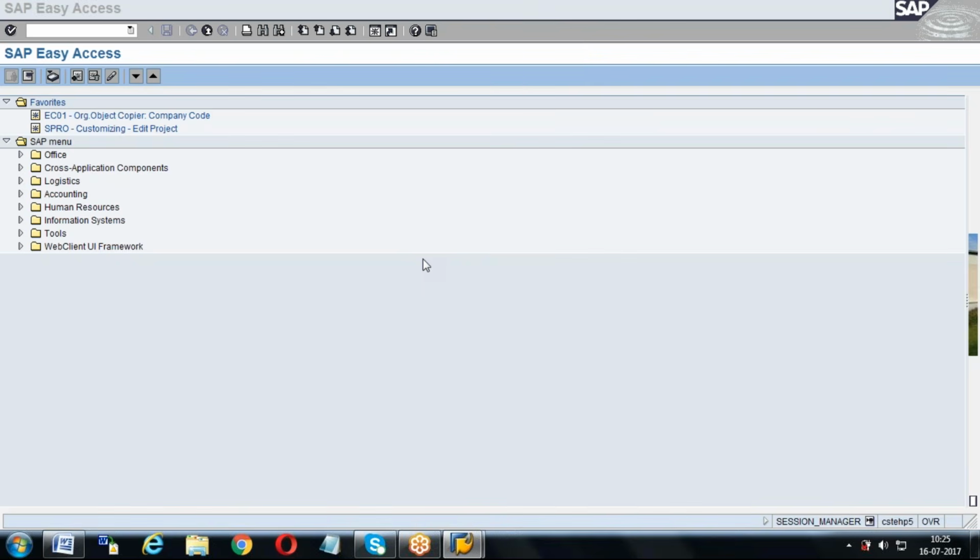We will get an understanding of how the business works, what kind of processes are available. Then we prepare an as-is questionnaire. With that questionnaire, we will have discussions of 1 week or 3 days or 4 days, according to the project size and time. We will understand that this process will happen like this, and we note down the points. Then we start preparing the business blueprint.